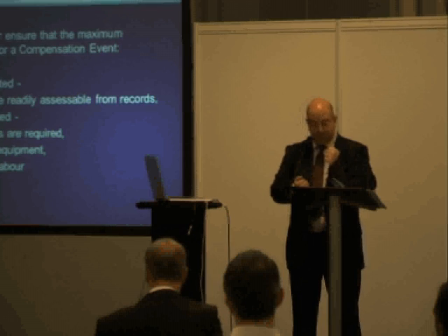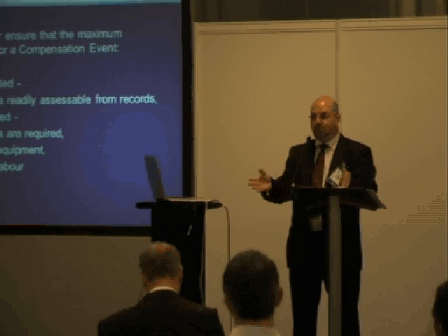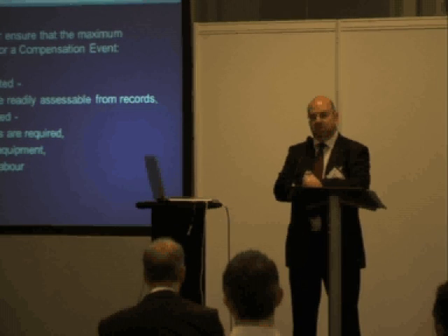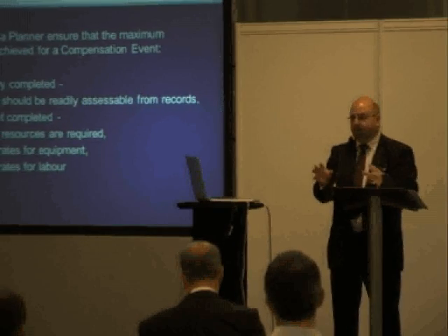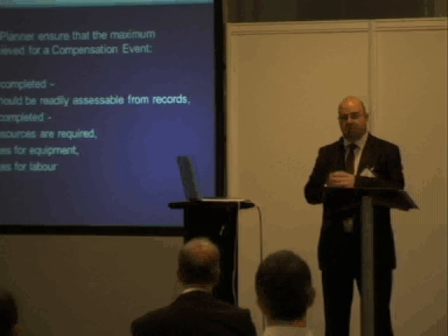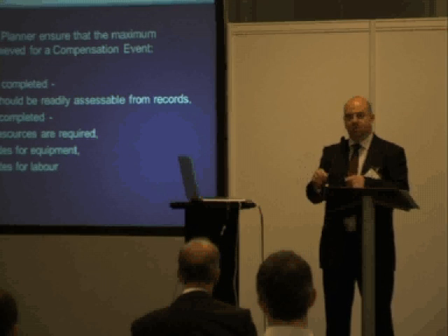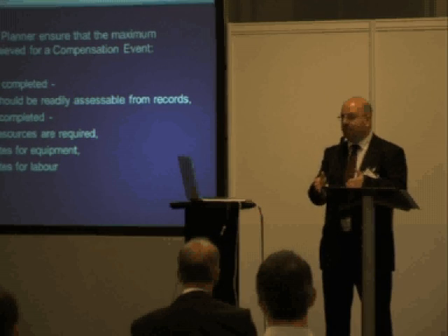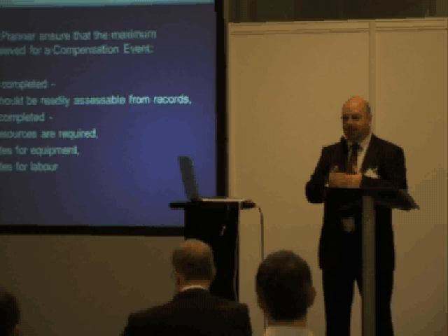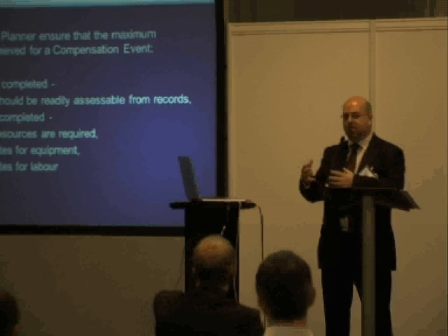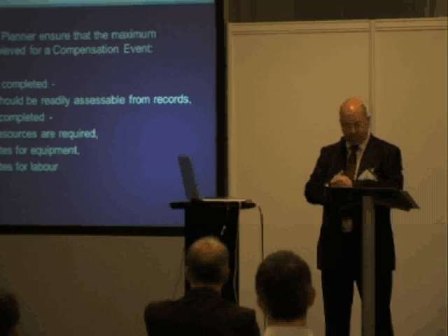Productivity rates for equipment and labour, as I've said before. If you've got a phasing diagram and you've got a nice pedestrian route to your work face, and for some reason the client takes that piece of the site away from you, and then you need to have them walk round, or in a worst case bus round, unless you can demonstrate that that was the route and that was the amount of time, again, it becomes very difficult to prove. So have your phasing diagrams. They need to be in sequence with your program. So as your programs develop, as the project develops, then your sequence and phasing diagrams should change as well.